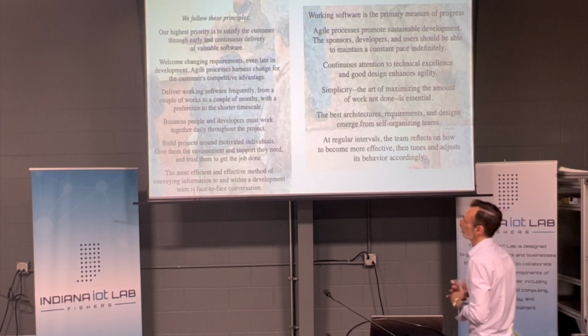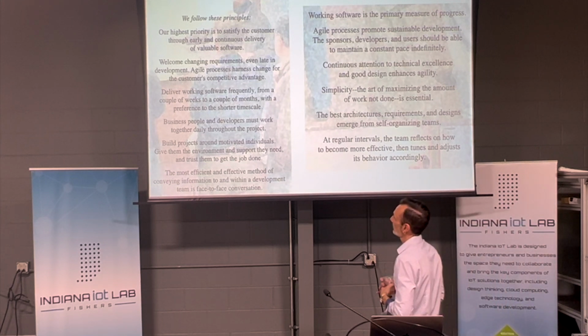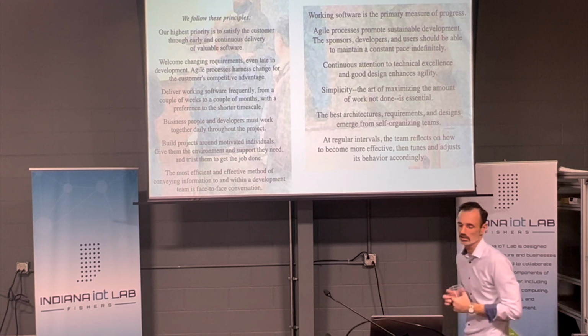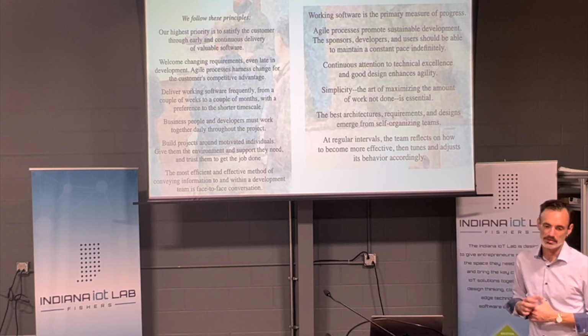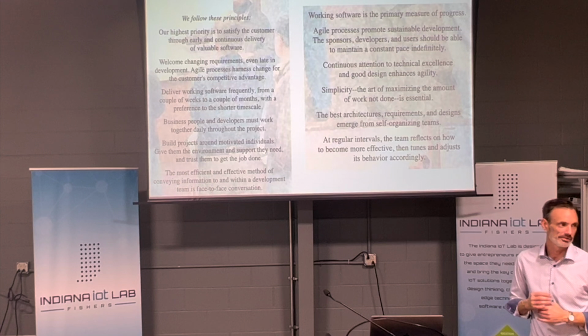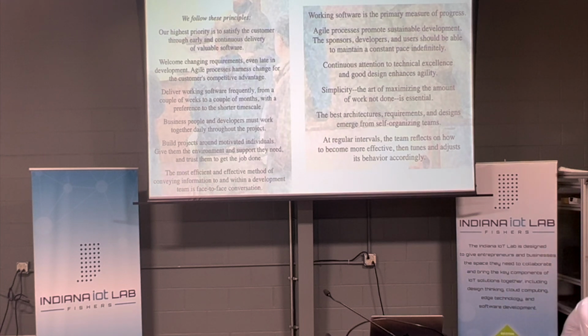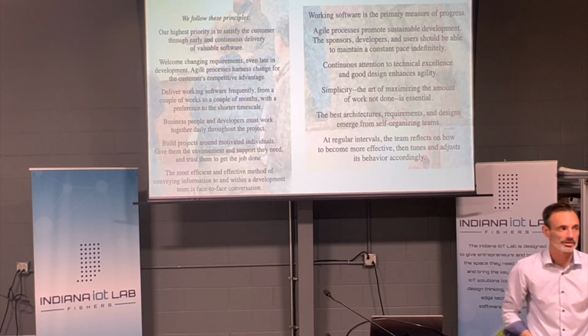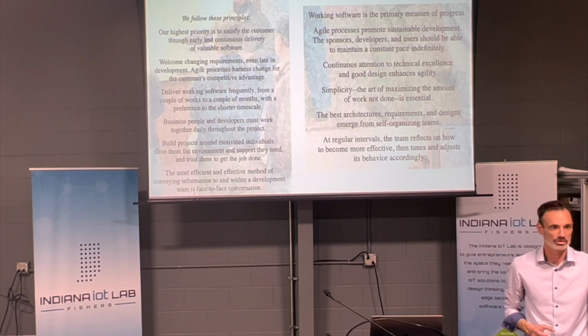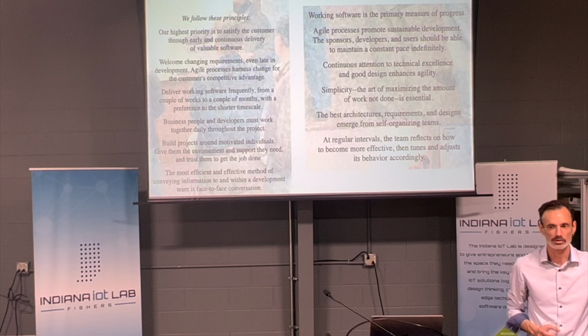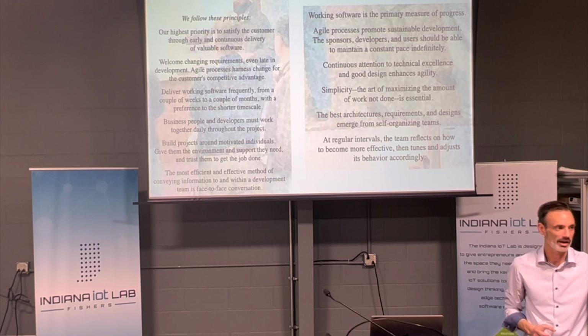Deliver working software frequently, from a couple of weeks to a couple of months, with a preference for the shorter time scale. Big bang development is very expensive, and it's like putting a lot of chips out on the table if you're going to do a 3-year development cycle. The market could change out from underneath it. You've got to work a little bit quicker and maybe build a little bit smaller and see how that goes.